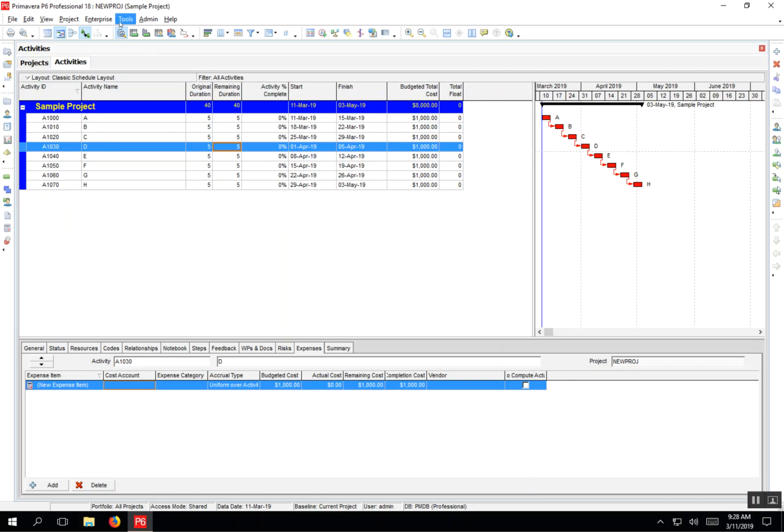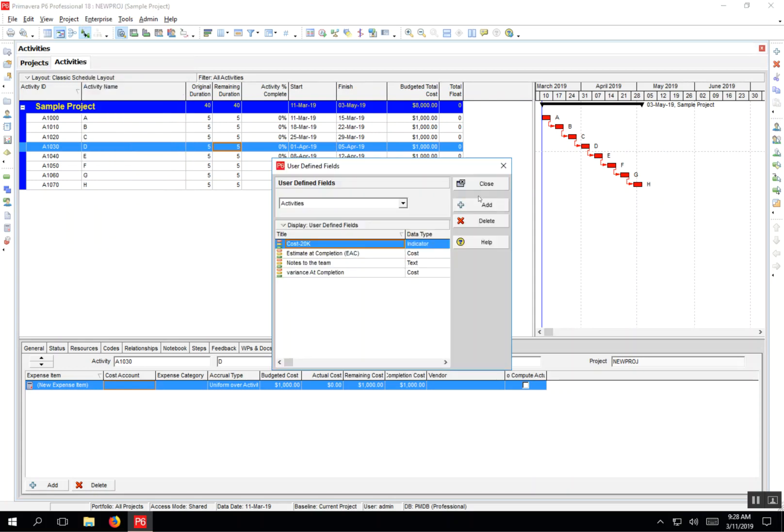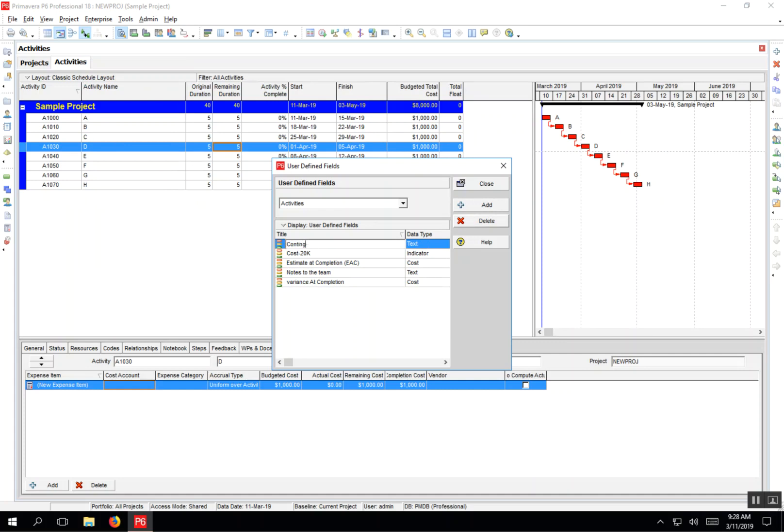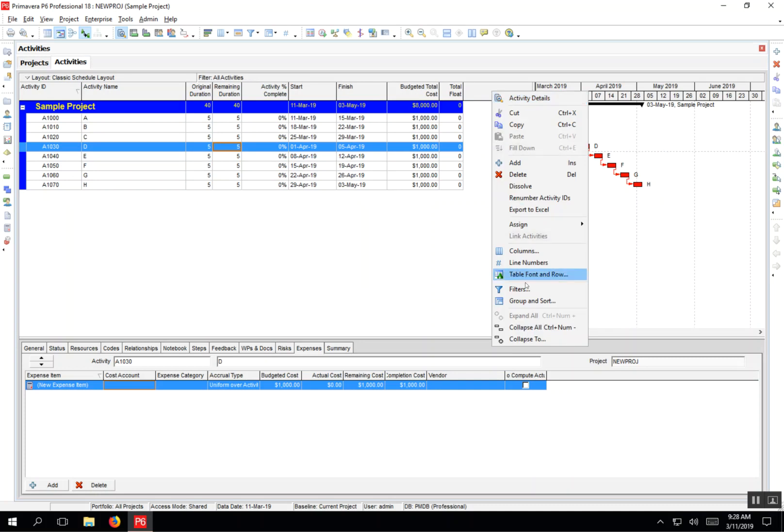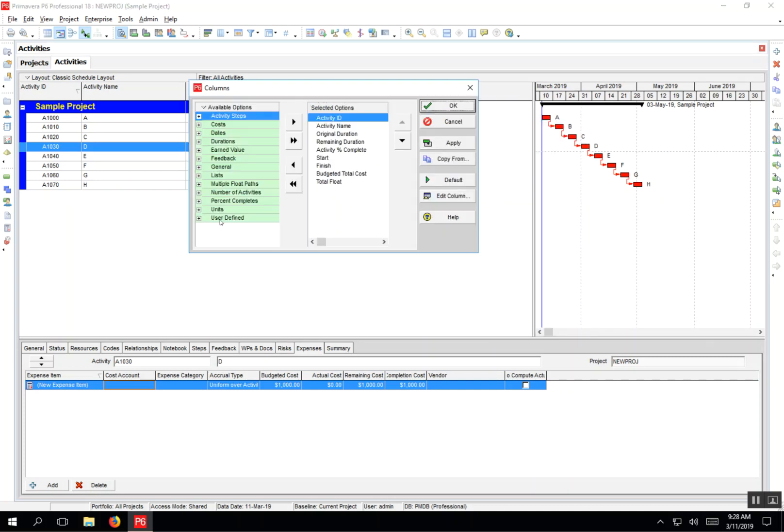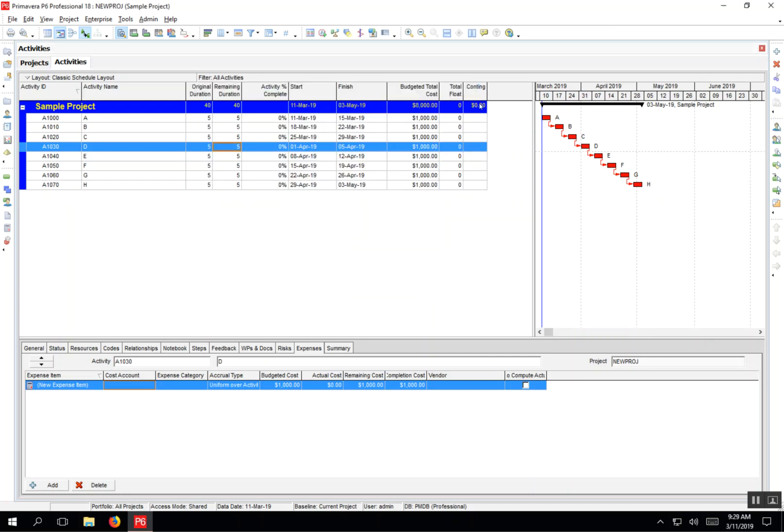I'm going to go to enterprise user-defined fields and add one called contingency. I'll abbreviate it and the contingency will be expressed as a cost. Go ahead and hit close there. I've added it. I'm going to add that user-defined field as a column right now. Here it is.